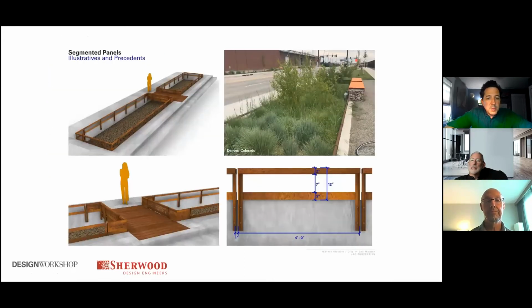However, as in every project, there's always a pivot at some point. And so at pretty much, I'd say, 25% DD with cost estimations coming in, we identified that there is a large overrun, big surprise. Value engineering is always a challenge on every project. And so from our perspective on stormwater, we had to look very closely at how the system was working and